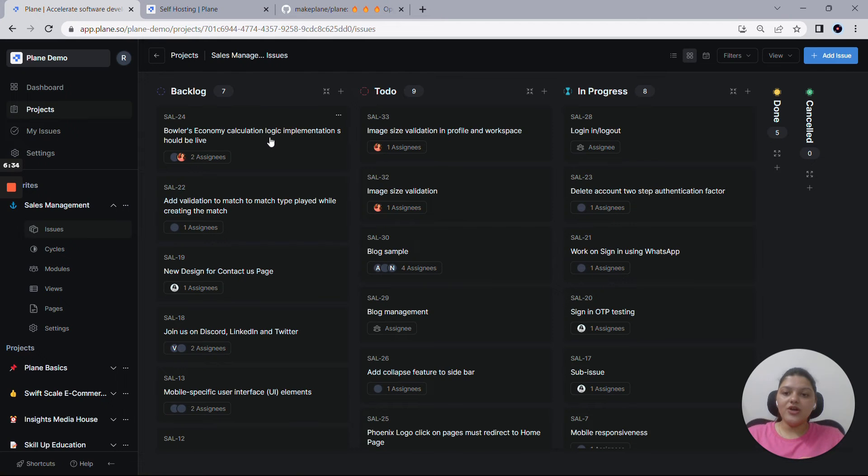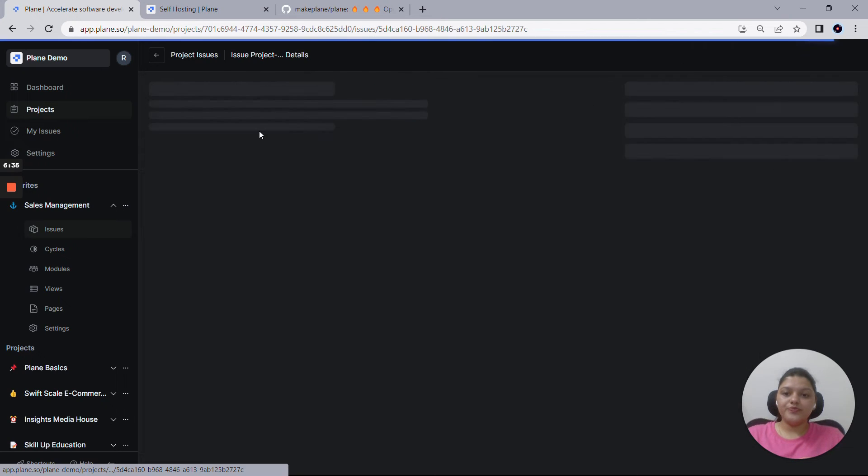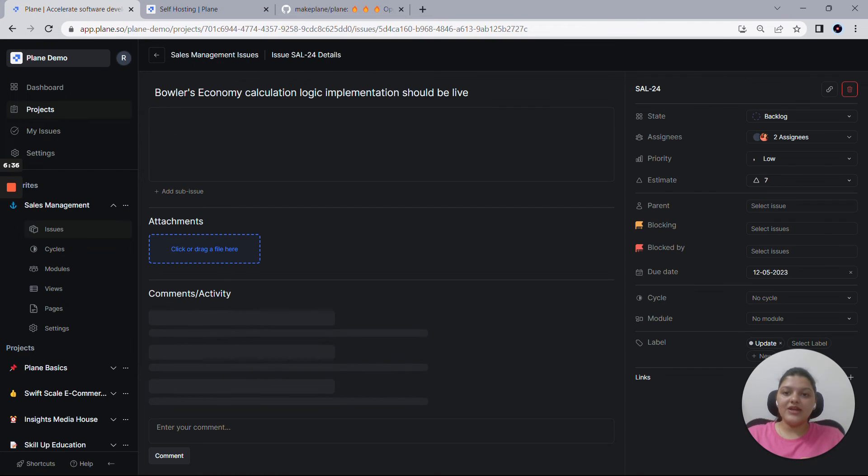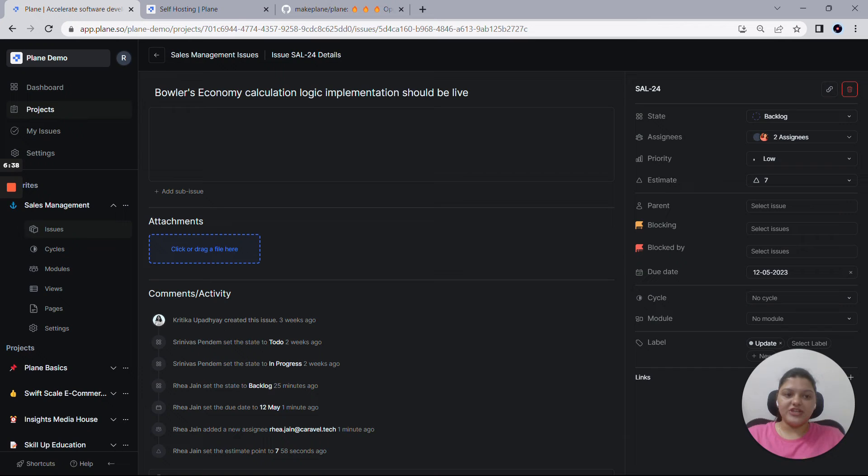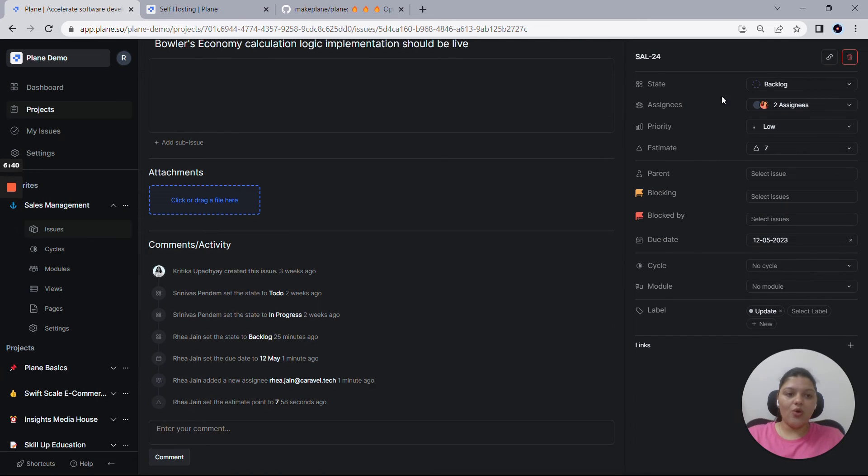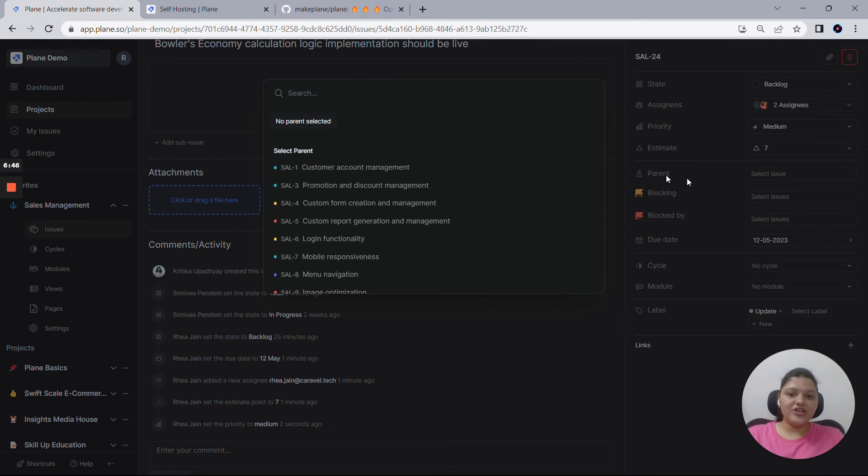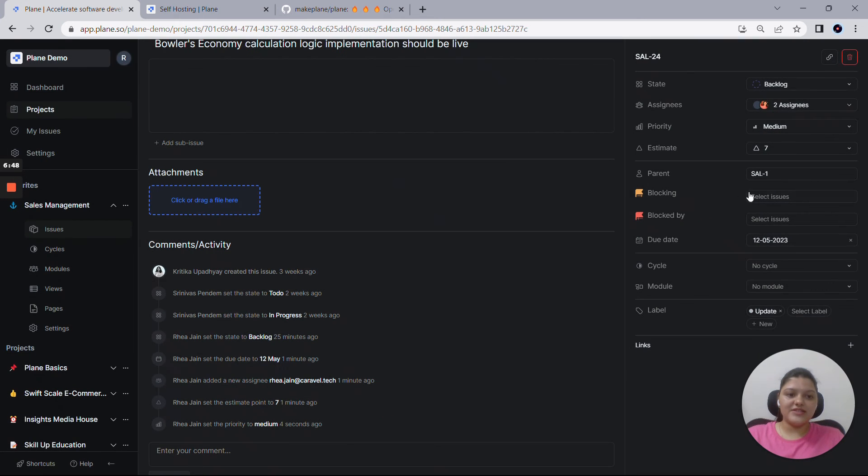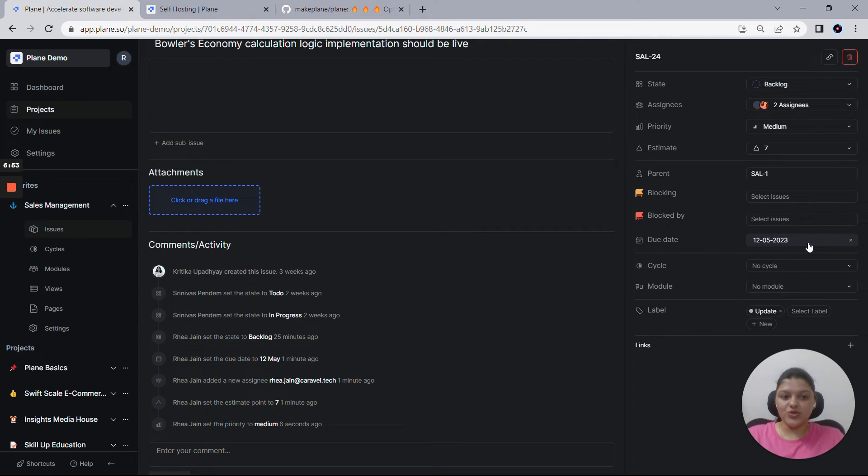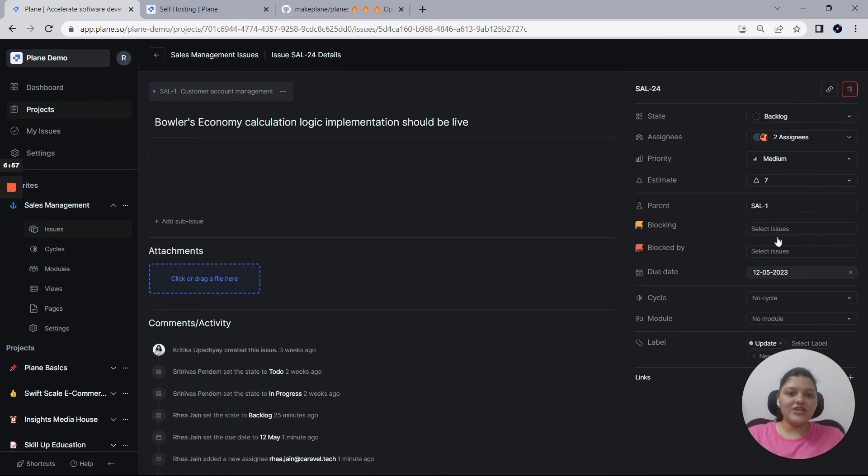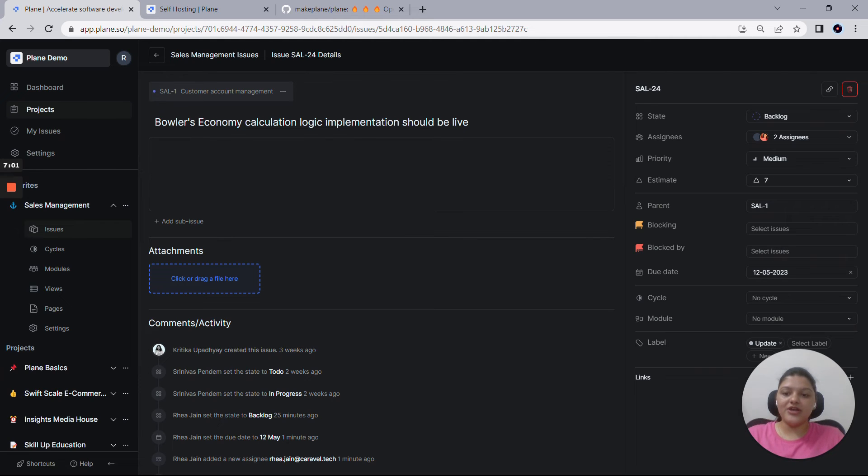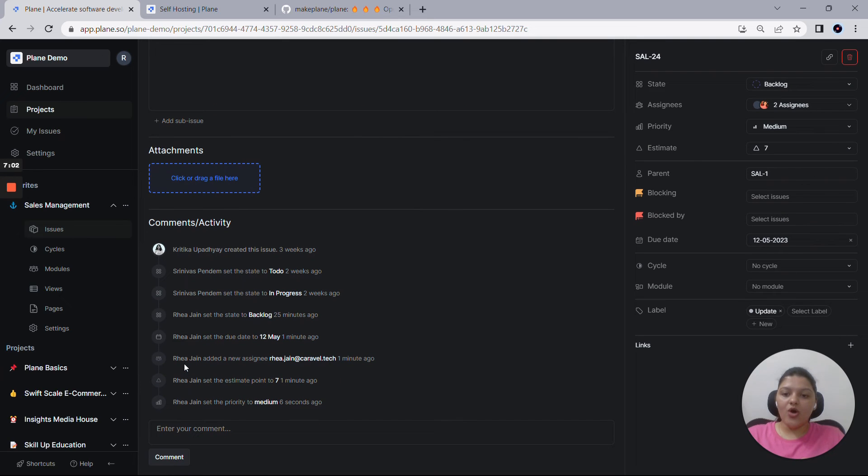Once you click on any issue, you'll get redirected to this issue details page where you can play around with all these properties here. You can change the priority from here and you can set a parent issue for this. Let's say if I want to put this as a parent issue. You can always choose for the blocking and blocked by issues. You can set the due dates, cycles, modules, labels, everything you can think of. And all these activities you perform here will be logged out here in the activities this way. And you can always add your comments as well.